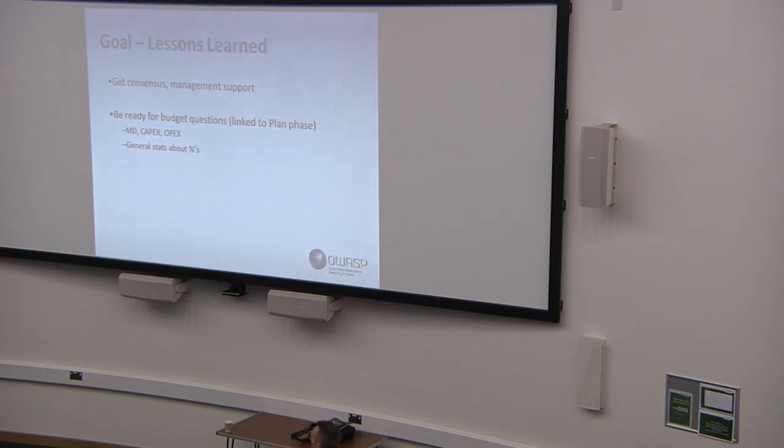For instance, if you're building a security competence center, the average is more or less that you have one person in the competence center per 100 developers. It gives you an indication of how much effort, or how much personnel, you will have to put into the security competence center.